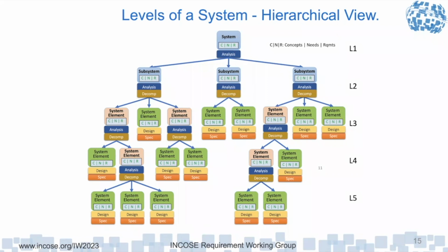So they shouldn't be in there. They should be in the statement of work. Somebody has to do the maintenance, someone has to do the training and management plans. So there should be a statement of work placed on whoever or whatever entity it is: someone shall. It's a good example of a common indicator that you've got the requirement either in the wrong place or poorly expressed, if you can't start it with the system shall. There is a qualification though.